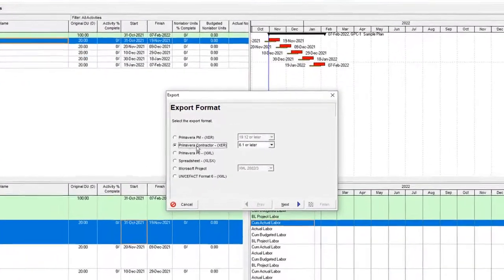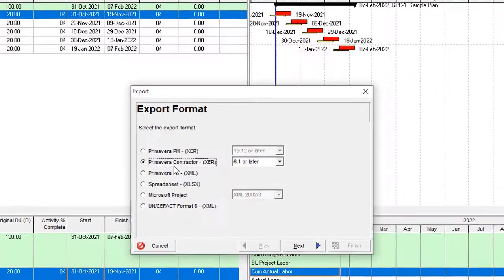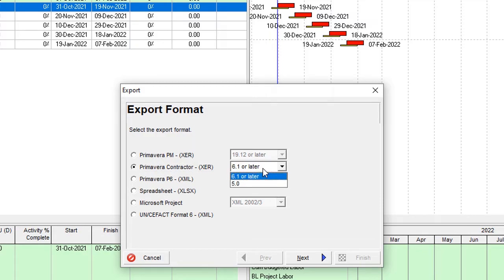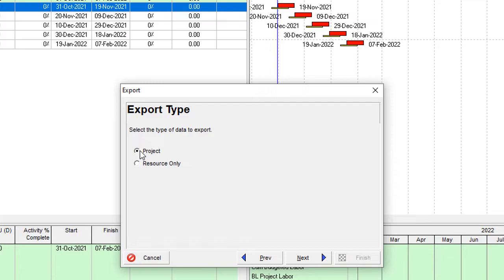You have another option for Primavera P6 Contractor. If you want to send this project to the Primavera Contractor software, then you can select the version and export the project.